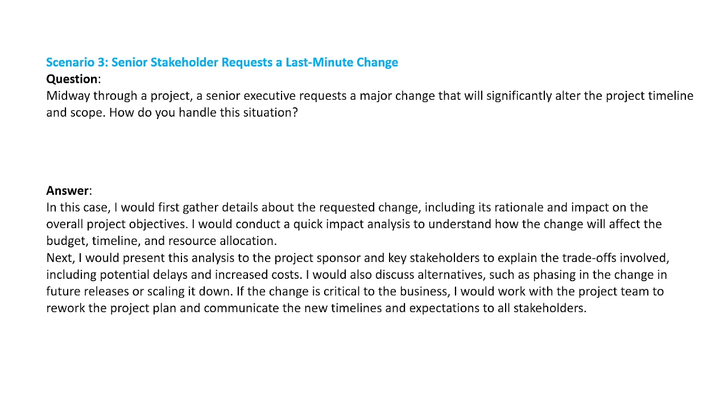Answer. In this case, I would first gather details about the requested change, including its rationale and impact on overall project objectives. I would conduct a quick impact analysis to understand how the change will affect the budget, time, and resource allocations. Next, I'll present this analysis to the project sponsor and key stakeholders to explain the trade-offs involved, including potential delays and increased costs.